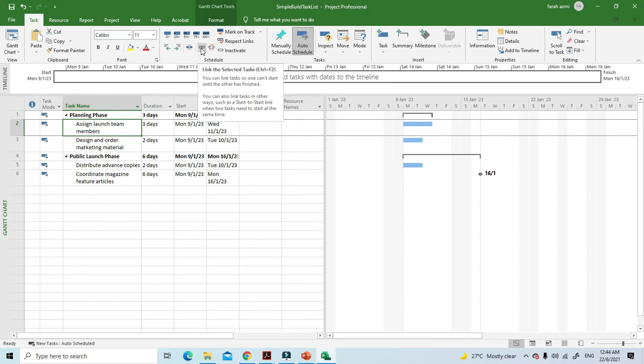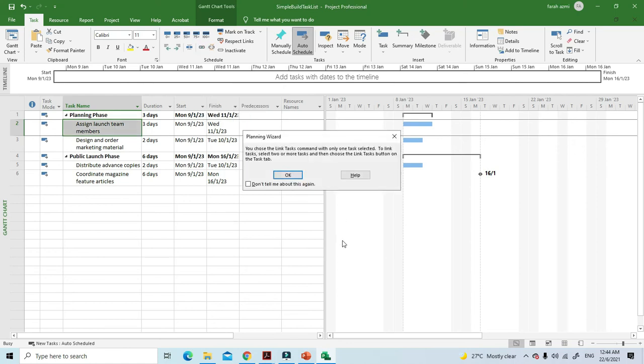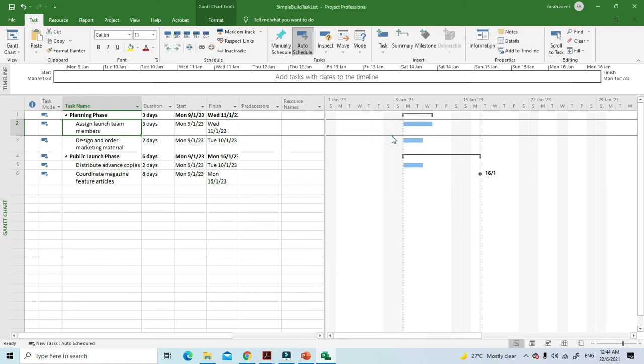This one. Okay. Oh, it's supposed to be 2, right? And then you link. So you see it automatically appears here. You link these 2 tasks, alright? So if you can see, the project links the tasks with the finish to start relationship.